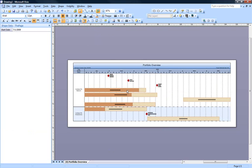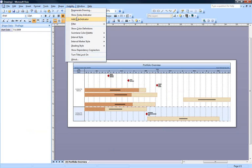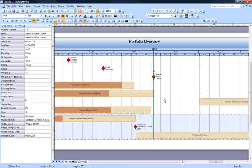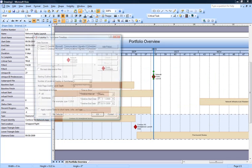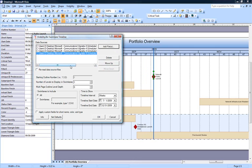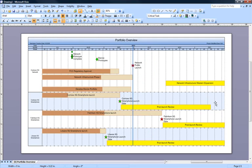Now I'll add a date marker to clearly show the network launch date across all Swimlanes. As the Executive Program Manager for this project, I also need to see the progress of the other 5G smartphones being developed by our network partners, Fabricam and Litware. I regularly receive their updated project files, and I'll add them to the tool file selection dialog. I can also achieve consistent formatting of my reports by checking the Apply Custom Fields option, which tells the tool to use names, colors, and milestone types that are pre-selected in the project custom task fields of the source files.